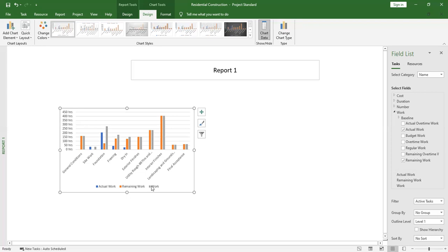That is the actual work. If a task is supposed to be done in 2 days and that is 16 hours, that is work. But if it is done in 3 days and you used 15 hours, that will be the actual work. That's what it is demonstrating.